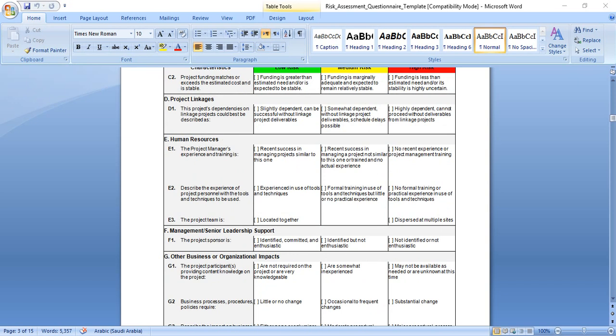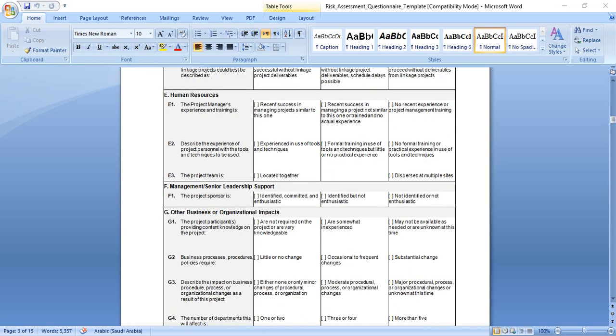Regarding project linkages, the project dependence on linkage projects can be described as: straightforward, dependent, can be successful without linkage project deliverables, this is low risk. Somewhat dependent, without linkage project deliverables, schedule delays are possible, this is medium risk. Highly dependent, cannot proceed without deliverables from linkage projects, this may have higher risk.